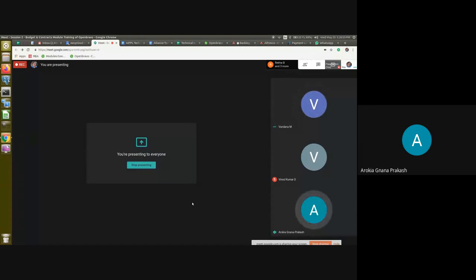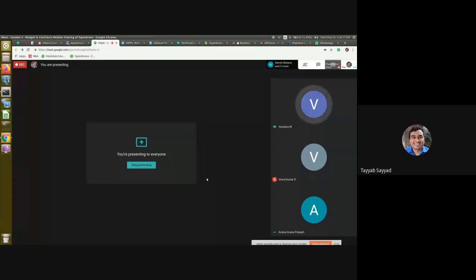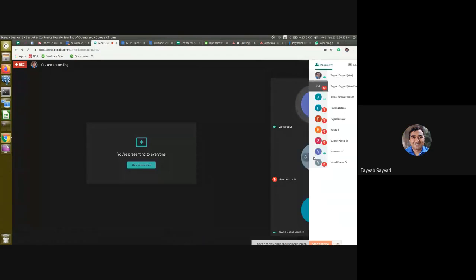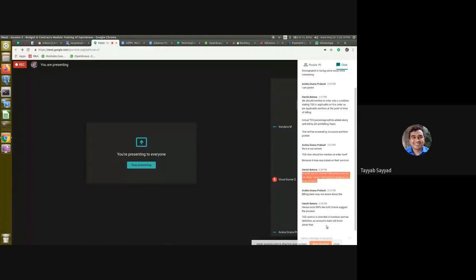Yeah, that is correct. That's what I am also saying, because the business partner is created by the credit buyers only. Anna also mentioned some points in the chat, saying the same thing, that it will be linked in the master only. If there is any change in the TDS section, the account team can go to the vendor definition, change the TDS percentage, and from that point onwards it will be applicable. Because the billing team should not add any TDS on their own. They should follow the work order terms only. If we give TDS, it is already configured with their business.